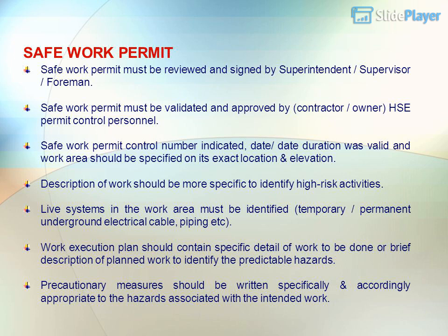Work execution plan should contain specific detail of work to be done or brief description of planned work to identify the predictable hazards. Precautionary measures should be written specifically and accordingly appropriate to the hazards associated with the intended work.